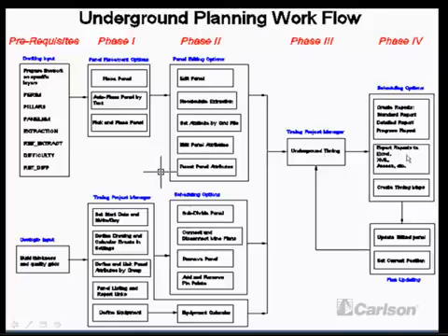We kick out reports, and after the mine plan's been created, sometime in the future, say 3 to 6 months, or whatever time has passed, you can then set a new start point for your mine plan, new start date, and rerun it again, and generate new reports there.